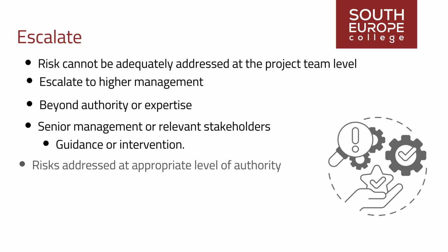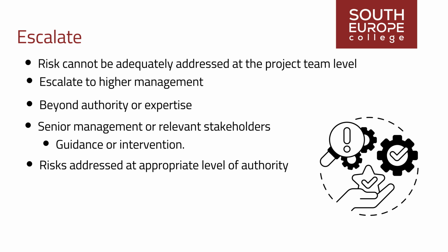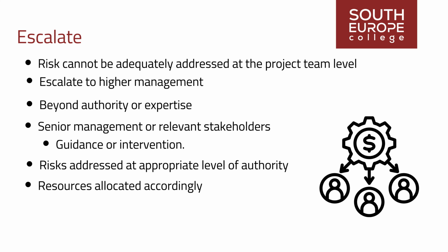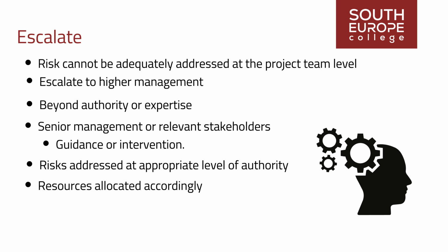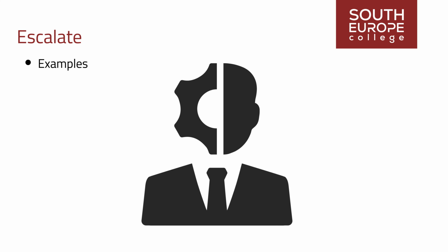Escalation ensures that risks are addressed at the appropriate level of authority and resources are allocated accordingly to manage them effectively. For instance, if a risk involves legal implications or strategic decisions, it may require escalation to the executive level for resolution. Examples of escalation could be: Example 1.